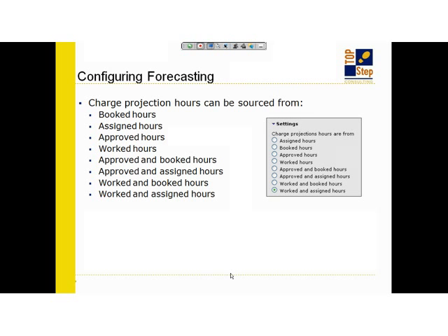Worked hours may fill that gap. Worked hours are any timesheets, but just know that it also picks up projected timesheets in your forecast. So still very limited forward viewing, probably a week at the most, or maybe end of month if you're doing monthly timesheets. But those are the four primary.